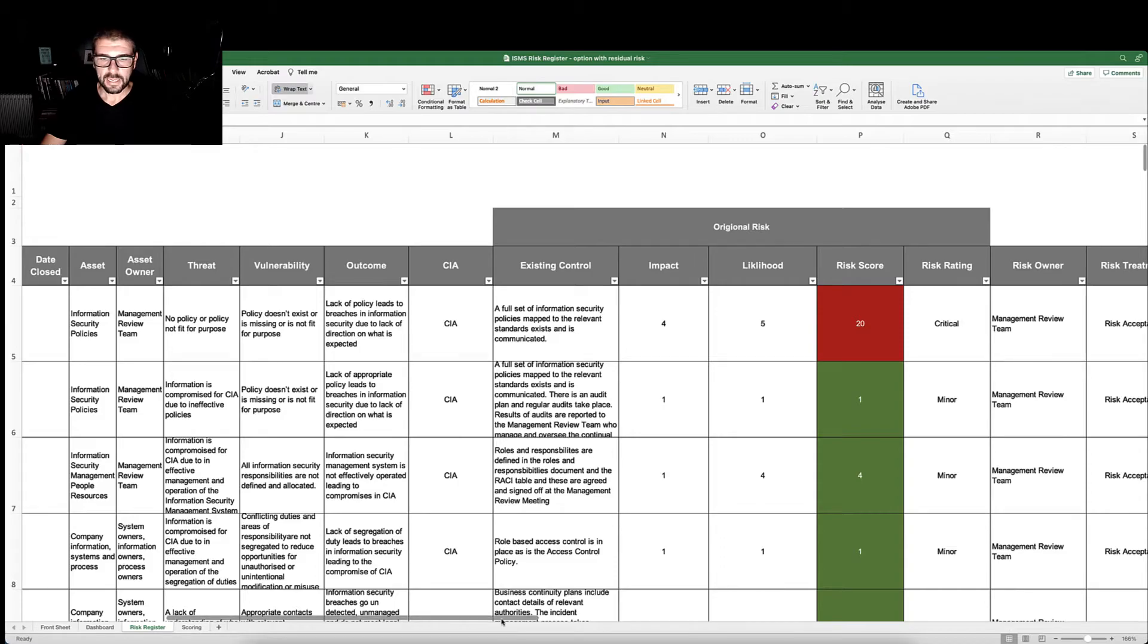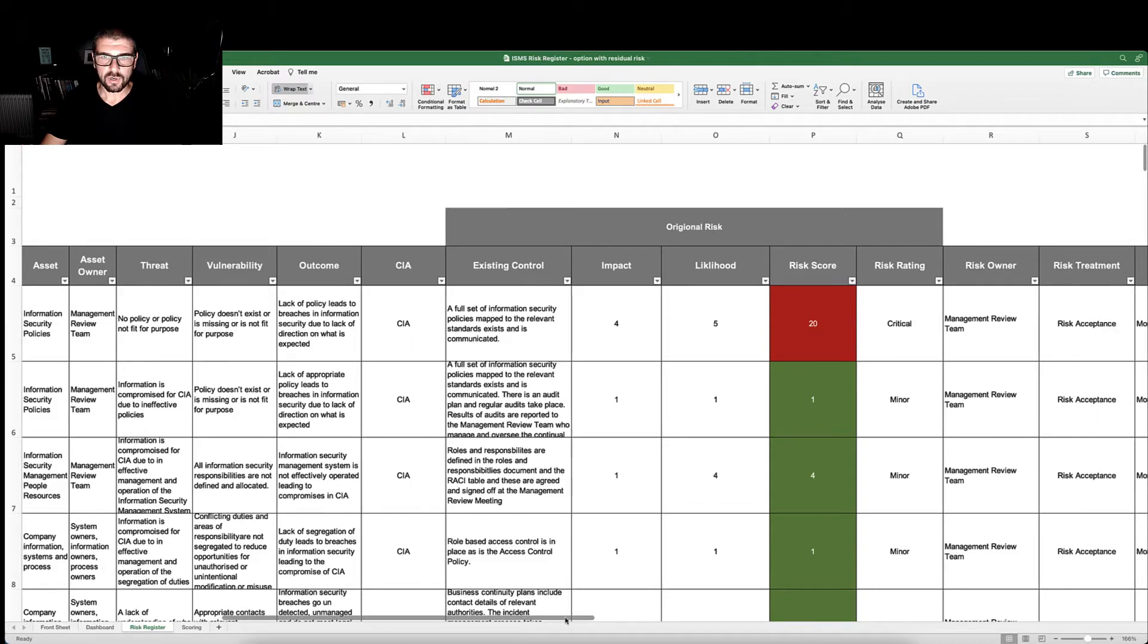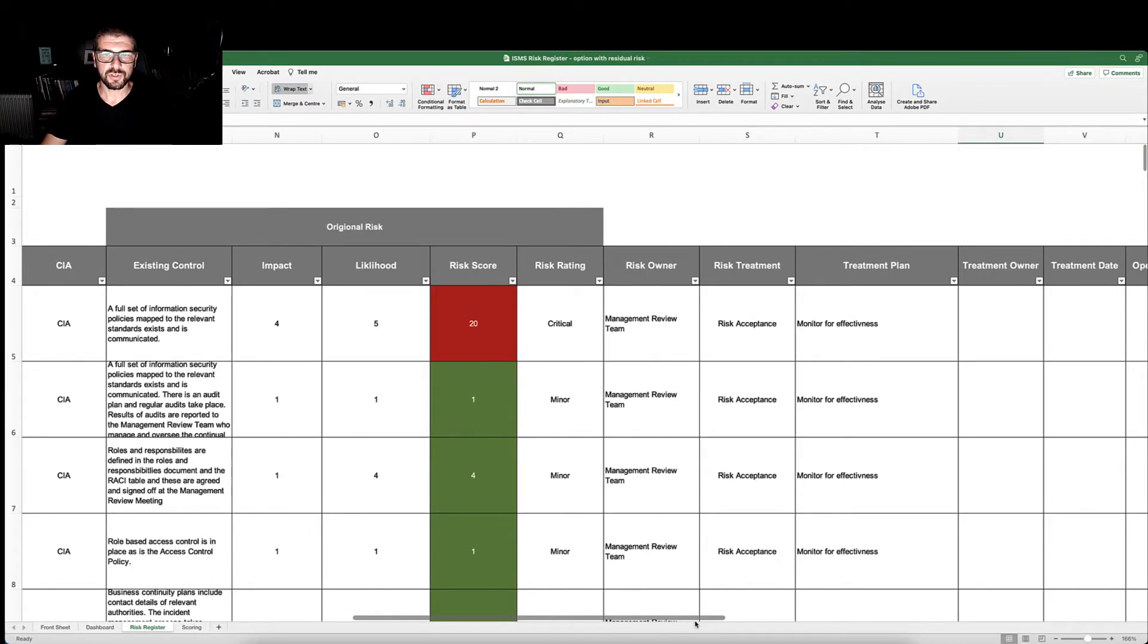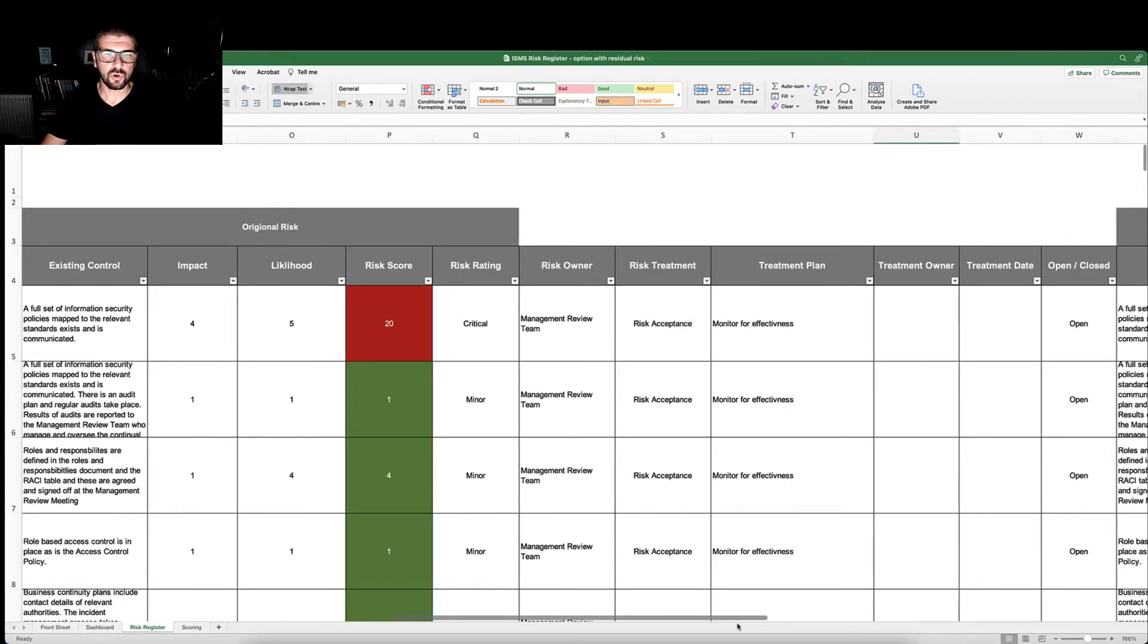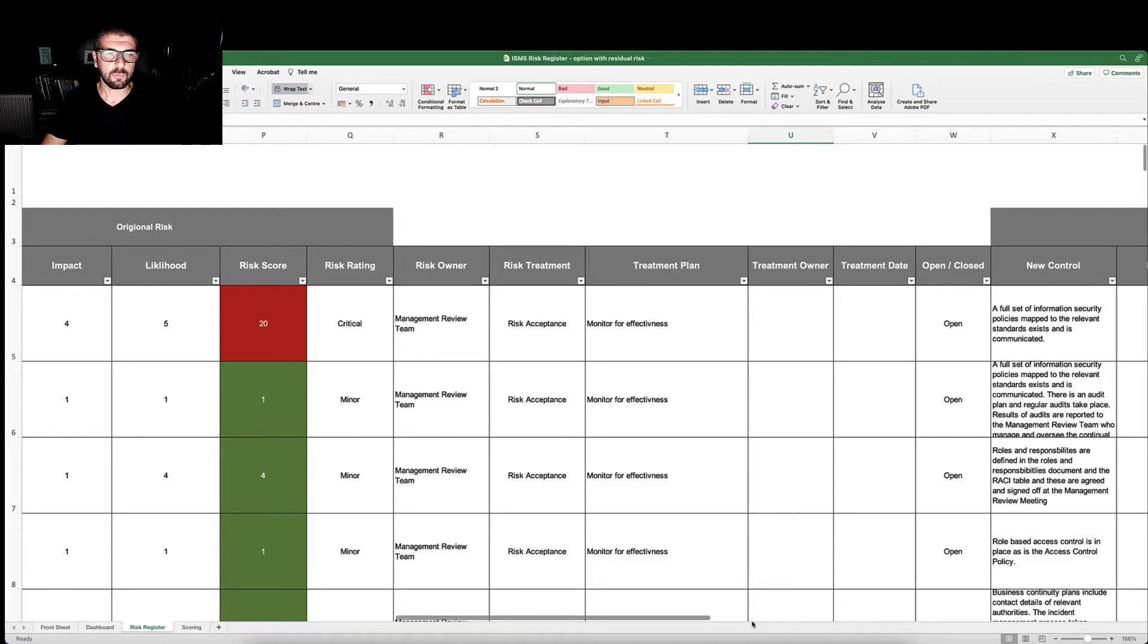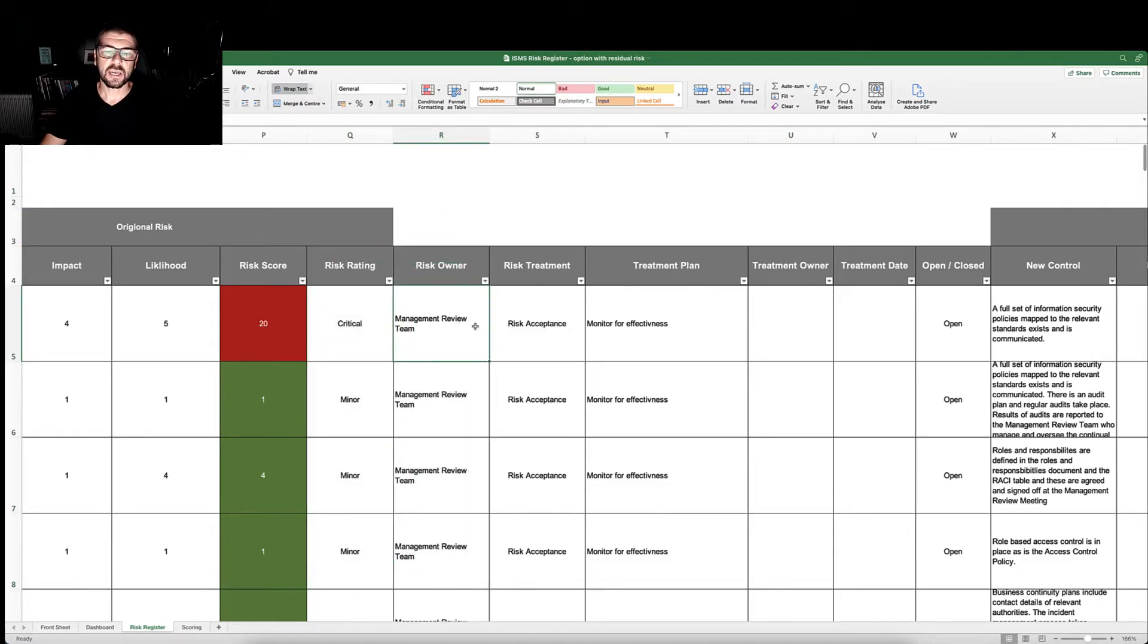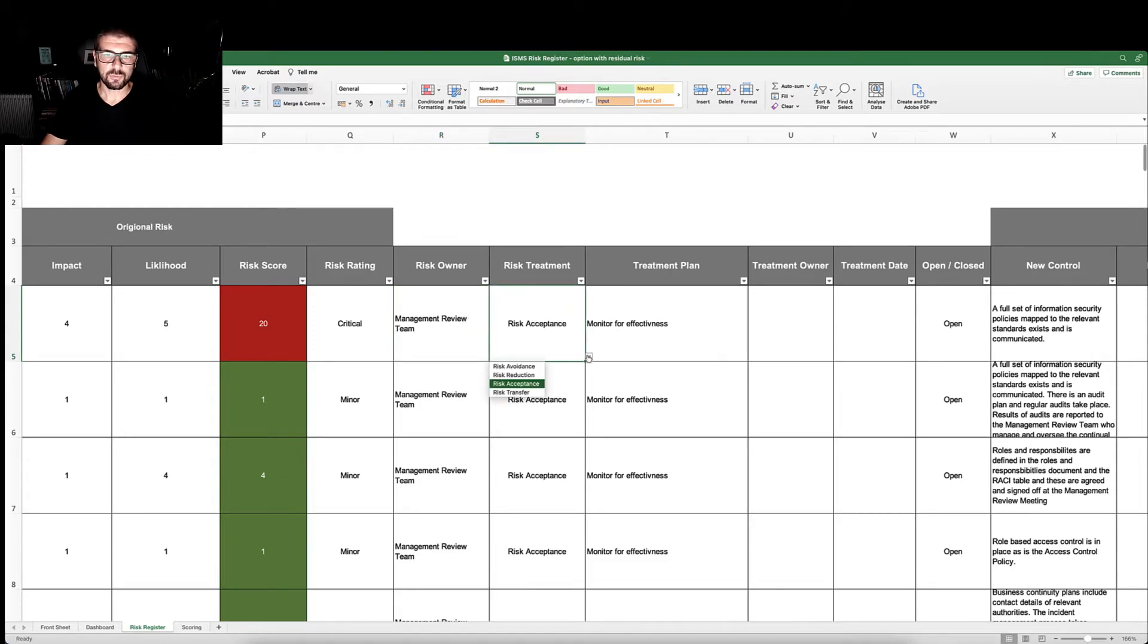We allocate our risk impact and likelihood which produces a score, and that will provide us with a risk rating. We assign our risk a risk owner and decide on our risk treatment, whether we avoid, reduce, accept, or transfer.